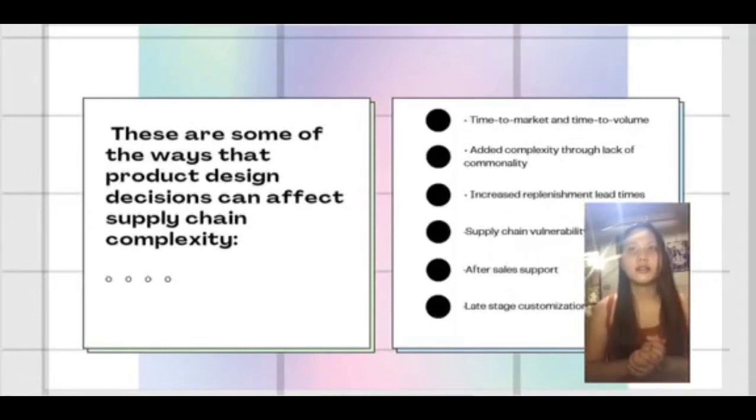Some design decisions will determine the choice of supplier, so the impact on replenishment lead time will be greater if the supply source is offshore.